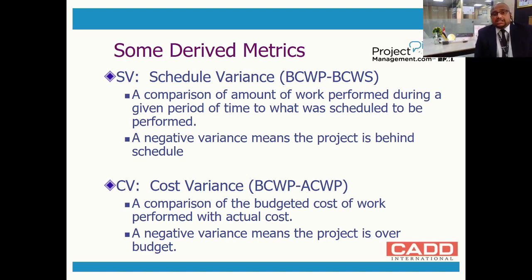That is earned value minus planned value. Earned is what you have gained and planned is what you have planned. So in day 2 I have planned 2 rooms, but I have completed only 1.5 rooms, which means you have a negative value because earned is lesser than planned, which means you are behind the schedule. This is how it gives you an indicator at the end of day 2 itself saying that, boss, you are behind the schedule. Come up with preventive measures.